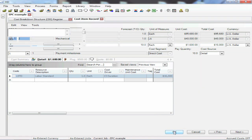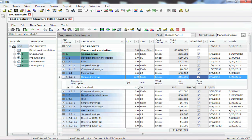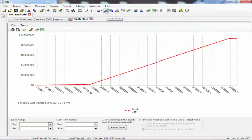And that's going to influence the timing. We only have to estimate the cost and model the cost one time. As you can see here, I'm using a standard labor resource to get this task done, but now by using those period quantities, we can break that work up over any period of time. So once we have a start and finish date and we know the spread of that work over those periods, all of that culminates into a view of costs over time. If we click on this cash flow, we can see what that cost looks like — whether we're talking about engineering, construction, or procurement work — all of those tasks rolling together, showing how that cost ramps up over time.